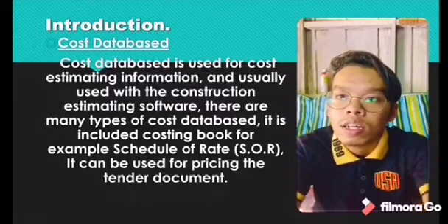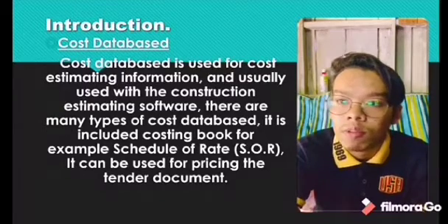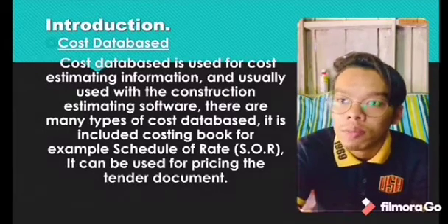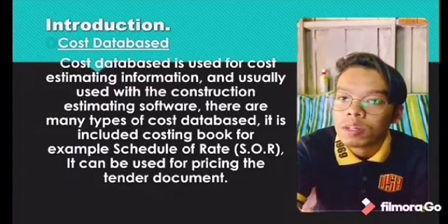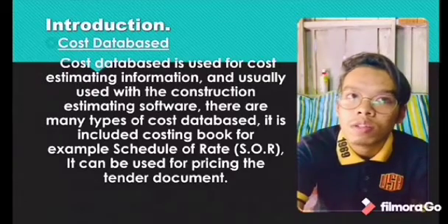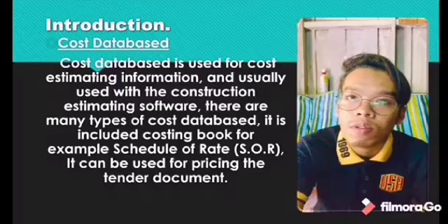For the introduction, cost database. A cost database is used for cost estimating information and is usually used with construction estimating software. There are many types of cost database. It includes cost books, for example the schedule of rate. It can be presented in the tender document, so the contractor and the quantity surveyor will use the schedule of rate to get the price of items for construction to fill in the tender document.